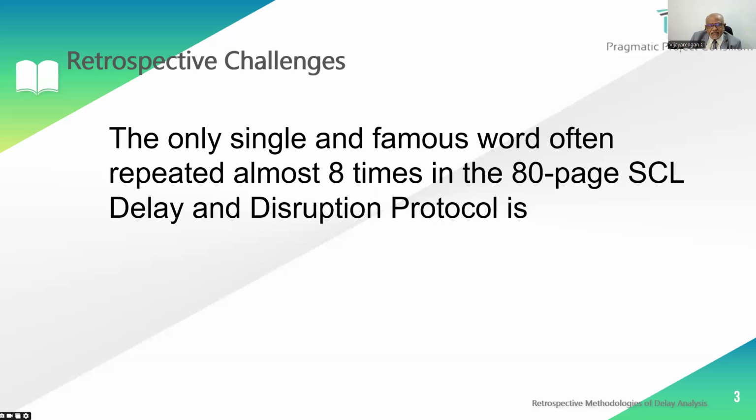Compensable means the delay is accepted by the party, and therefore he agreed to pay the compensation. Whereas with non-compensable delays, he accepted the delay, but he is not ready to pay the compensation. So at the end of the day, he gives a conclusion based on closing the assumption log as I created, as per the investigation he started, and he submits the report.